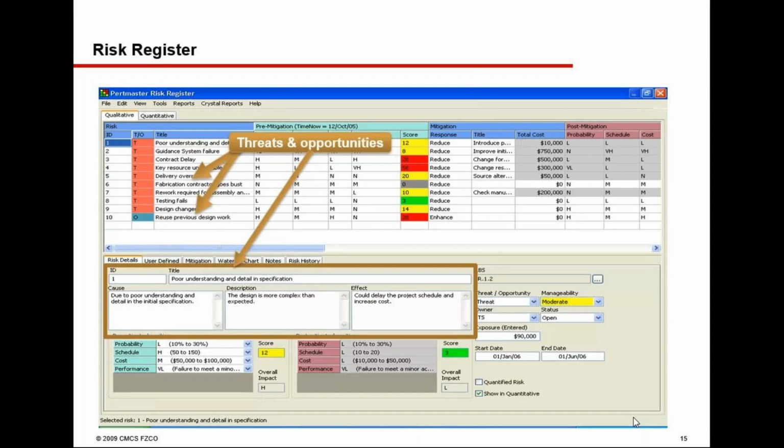And you also have a detailed mitigation plan wherein you can define step by step the procedure or process to be followed so that we will be able to achieve the objective, and every step may have cost associated with it, and that will help you in understanding what will be the mitigation cost.